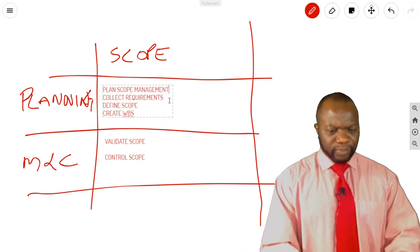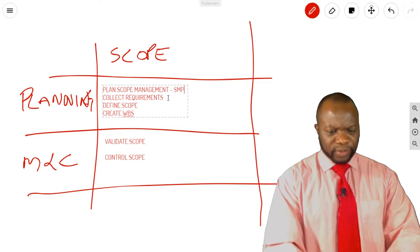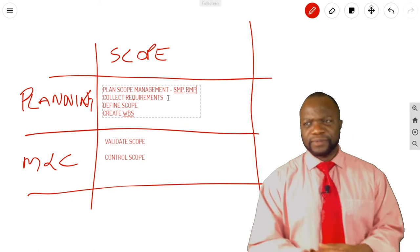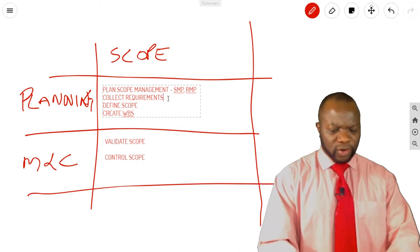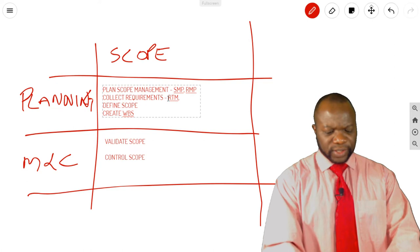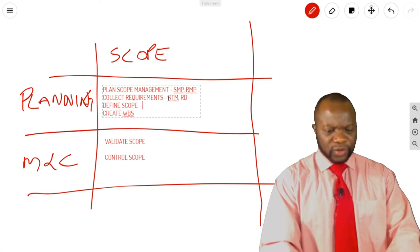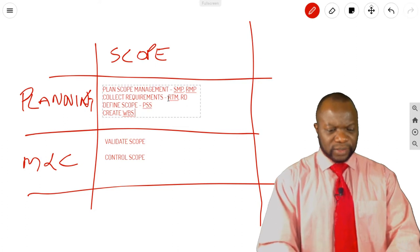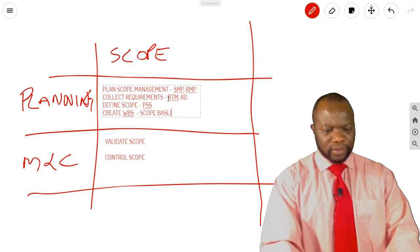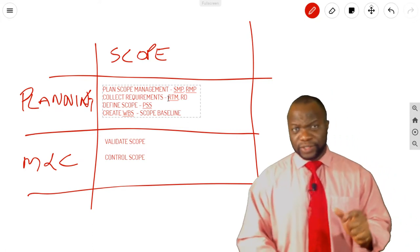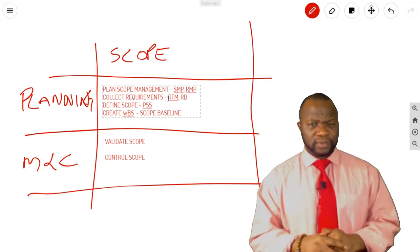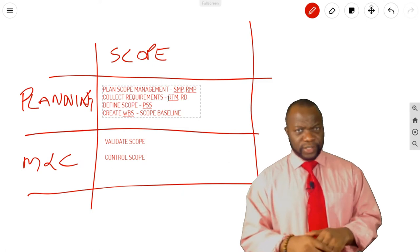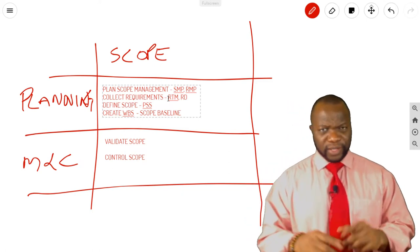Well, Plan Scope Management is going to give you the Scope Management Plan and the Requirements Management Plan. Collect Requirements is going to give you the Requirements Traceability Matrix and Requirements Documentation. Define Scope is going to give you the Project Scope Statement. Create WBS is going to give you the Scope Baseline, which contains three things. Do you know which three things they are? The WBS, the WBS Dictionary, and the Project Scope Statement. You've got to remember these things.